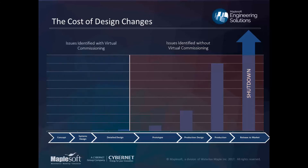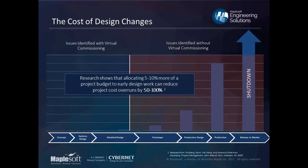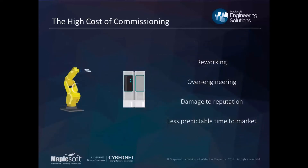The key idea behind virtual commissioning is that it allows you to start identifying these problems earlier, and of course earlier means it's less expensive to make changes when you find those problems. These techniques have been used in aerospace and automotive for a long time. Research actually shows that doing more of this work upfront can save you dramatically in the long run.